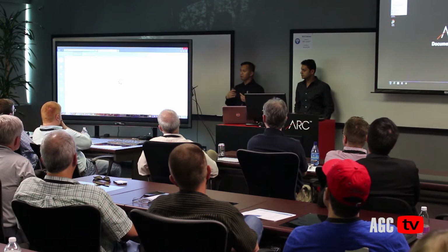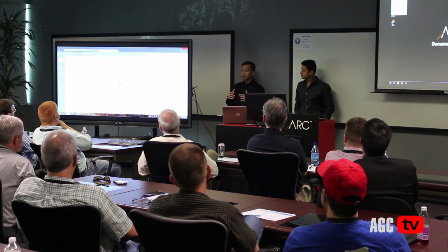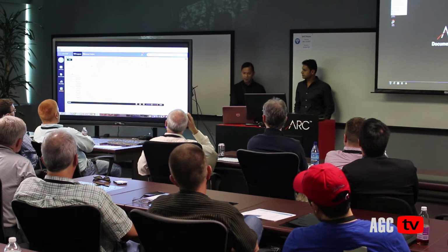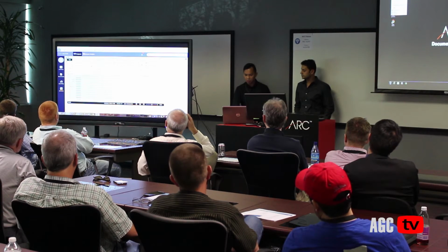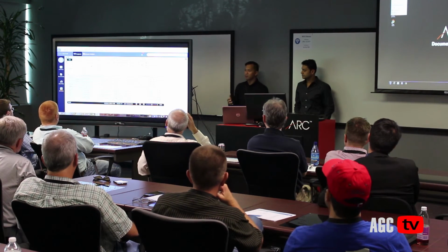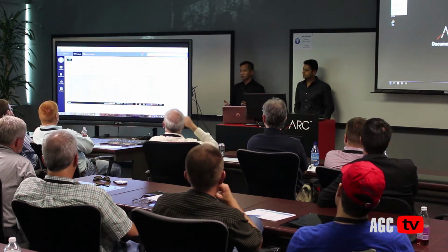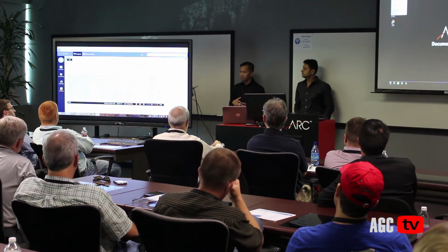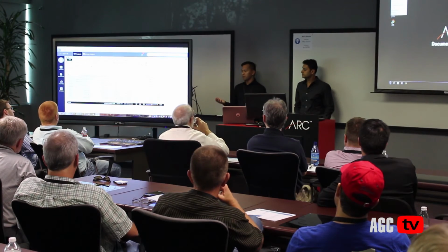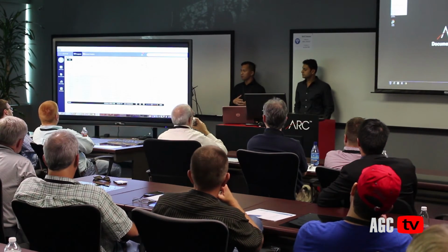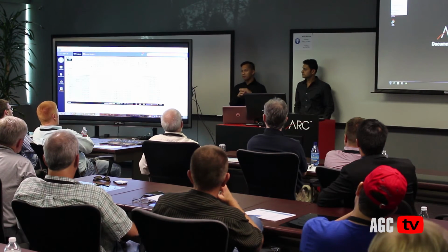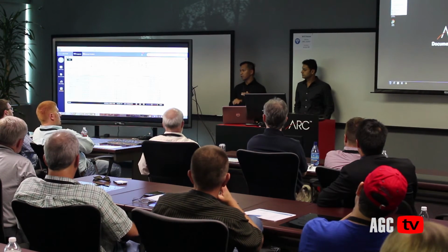Also, when you're uploading files on Skysite, it's not being versioned by the upload date. It's being versioned by the revision date. So you can upload, let's say, your permit set, and then later on you discover that there are some existing drawings that you want to put in Skysite for history purposes. You can upload those and set it to, let's say, 2014. It will identify that it's not the most current version. It will layer it behind the current version of the sheet.